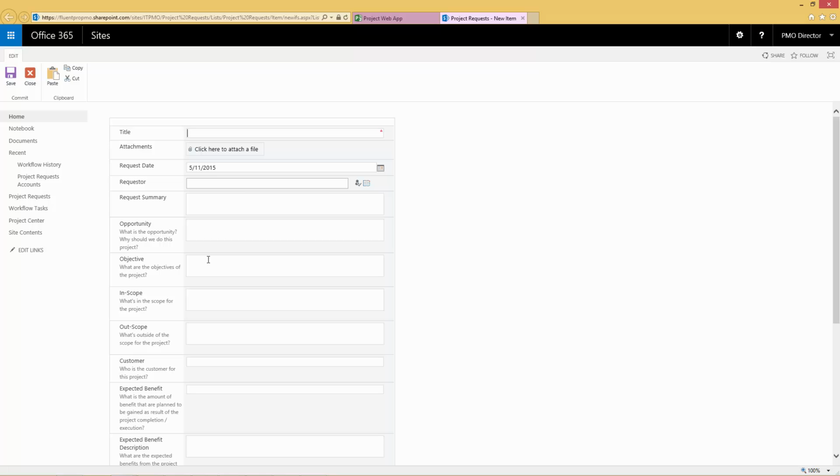So what you can do here is to provide to your employees access to this form. They will type all the information they can see on this form, and when they are ready to submit, this information will be submitted for approval. You need to appoint a specific person who will be notified when there is a new request. The person will go to this request. They will be able to review that information, if required to request more information. And after that, request can be approved or rejected.